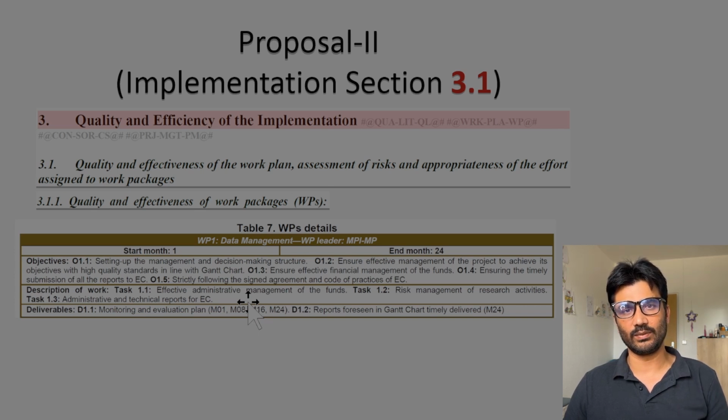For example, my synthesis is multi-step, so for each step I gave 1 task, and then the optical characterization, 1 task, the electronic characterization, 1 task. All these activities were included in the tasks, and then came the deliverable. A deliverable is something that you can show.